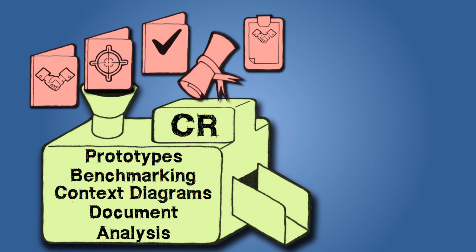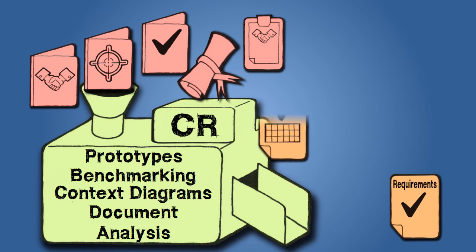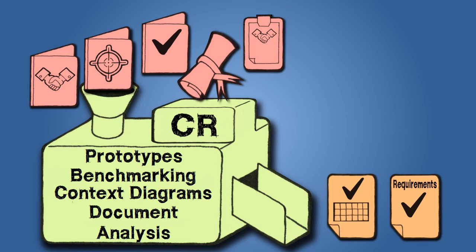The outputs of the collect requirements process include requirements documentation. Requirements documentation describes how the individual requirements will meet the business need. Usually, these requirements start out at a high level and then are defined as more details about the project requirements become known. The requirement traceability matrix is a table that traces requirements throughout the project lifecycle.